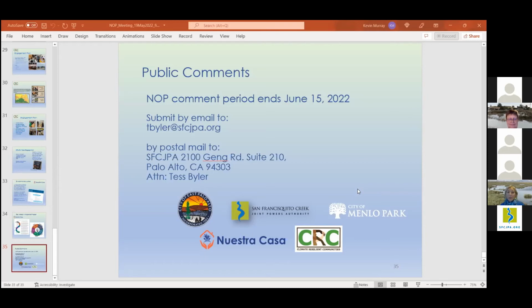Sure, I can take this one. So the process is that we have to have the project constructed. We have to have everything in place, our O&M manual, our easements, and then we will submit. O&M means operations and maintenance. It's how we're going to take care of everything once all the construction is complete.